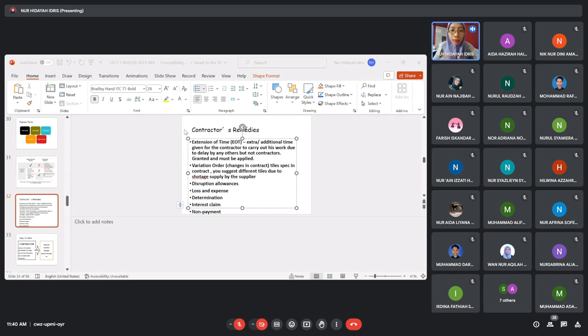So it's the same as the contractor earlier. He knew it had rained for 2 weeks. He just sat there and didn't apply for EOT. He assumed, it's okay the project is delayed, not my fault. So I should get EOT because it's not my fault. The weather is beyond my control; if it rains, I couldn't stop the rain. Right? So he assumed it's okay, it's not our fault, so we'll definitely get extension of time. It's a wrong mindset.